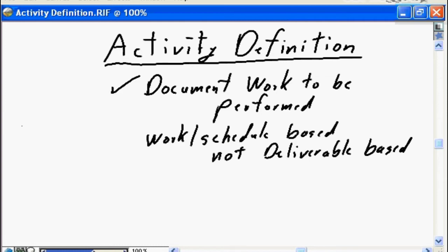What do we mean by that? Basically, we're going to have one WBS element to one resource. Whereas a deliverable-based WBS could have multiple resources. You could have 3 or 4 or 5 analysts assigned to a task to define, understand the current situation. An activity-based WBS would break that down where each resource would be assigned to each component, a unique component of